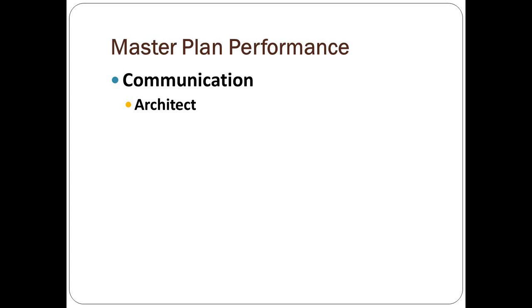They can show you what a presentation might look like, but you've got to communicate with engineers, civil engineers, audiovisual lighting engineers, and IT infrastructure engineers that are designing your IT equipment and services in your ministry. Interior designer. Often interior designers are not included until after the design is done, and the engineers have already put the outlets and the light switches and the light fixtures, and the other engineers have put their equipment for fire protection and all these thermostats and all this other stuff all in the building.